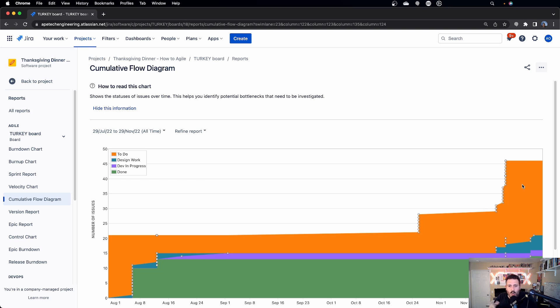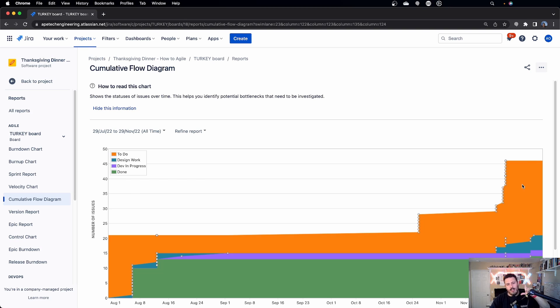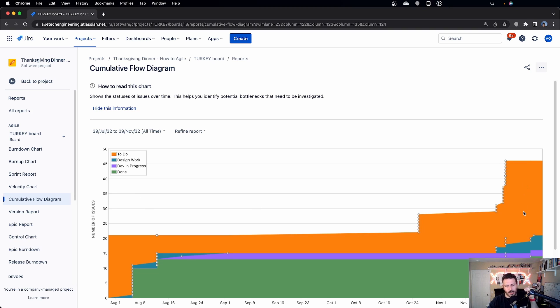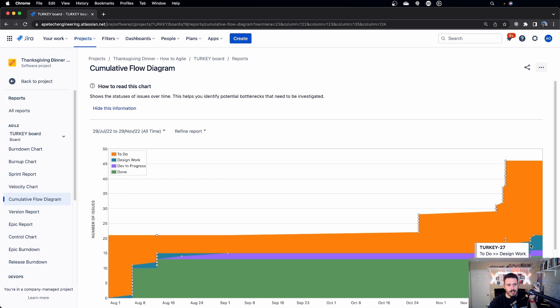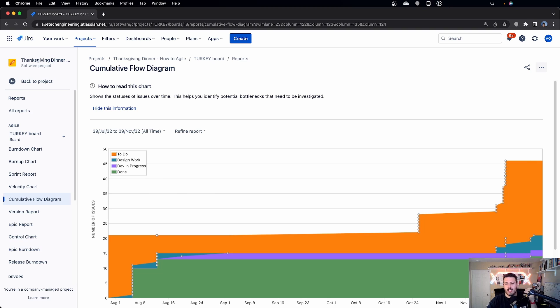And while that could be very subtle, it's actually very valuable if you know what you're looking for here. And so ultimately what you're seeing here is you want to see the trends of your teams to see how they're performing relative to the current objective. And what I mean by that is there can be a situation where if you look at the little rubric here, the orange represents our to-do work. This teal looking color represents design and work. This purple means dev and work. And then the green means done.